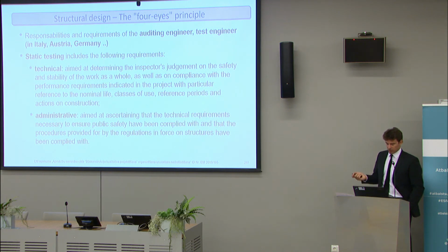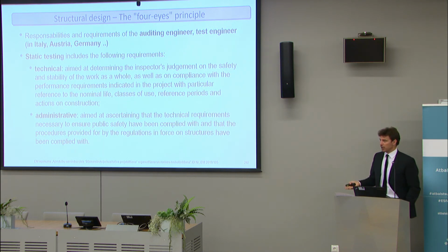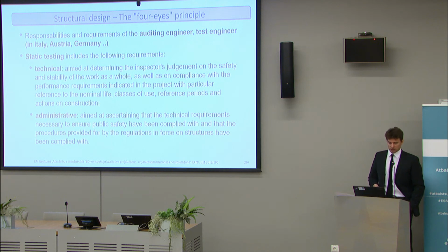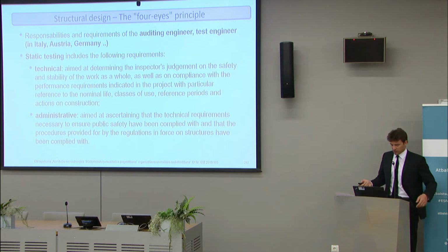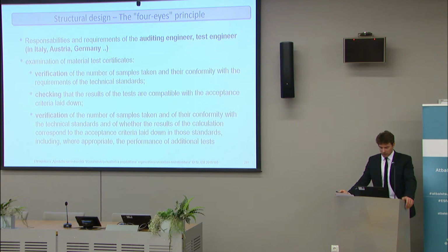Okay, and that is also something important: at least, as I was saying, in these three countries, the checking is not only technical. They also check that you had all the authorizations to make your building. They check that you had technical requirements to ensure public safety, that you made the necessary tests, that you made, for example, the environmental impact analysis if it was required. So in the end, it has to check many different things, and that's why probably it is so important.